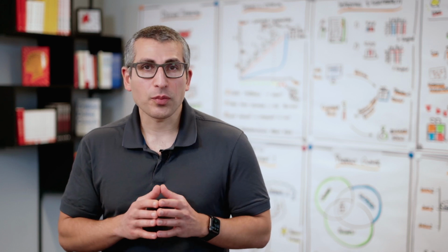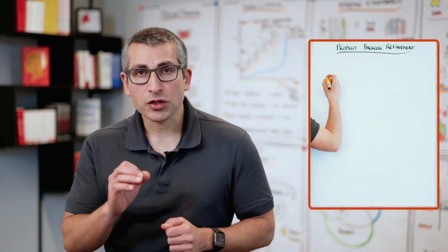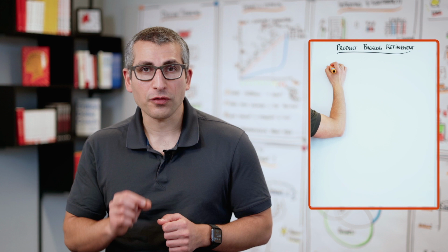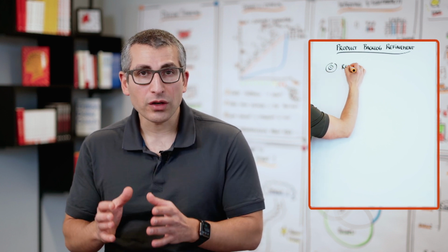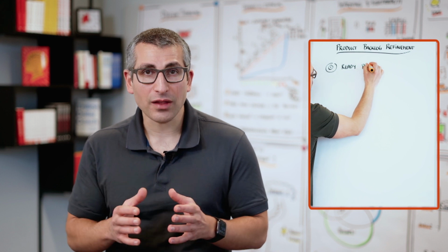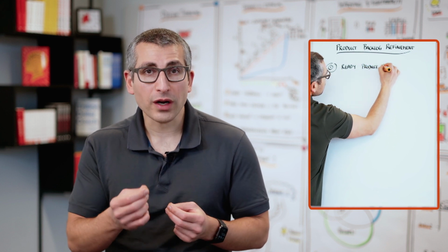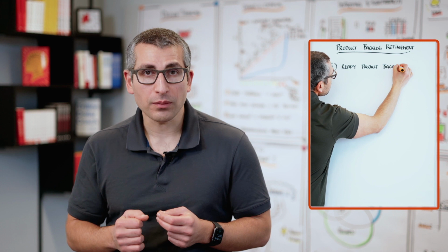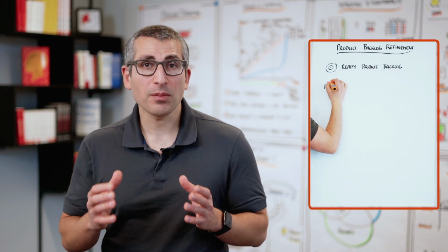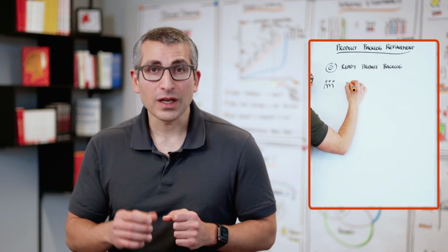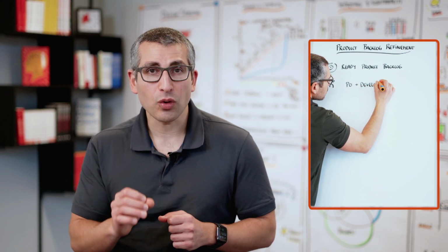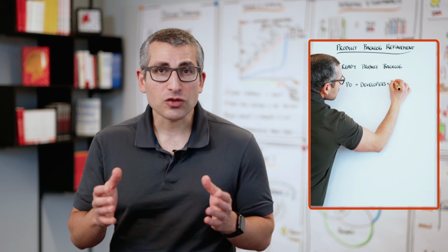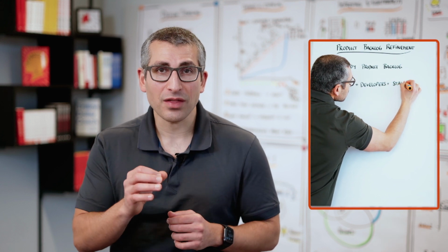The objective of the product backlog refinement is to create a ready product backlog for our next sprint planning. This means that a product owner and the developers get together and work through the product backlog one by one. Sometimes it is recommended to also include some of your key stakeholders, as they might provide really important input. As a Scrum Master, you can facilitate that event.